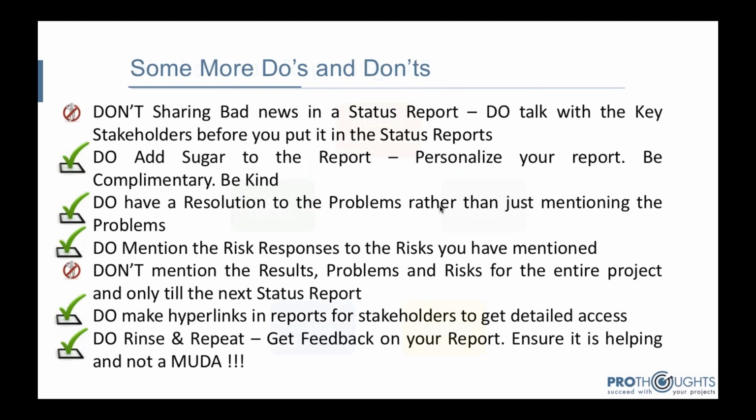So these are some of the things you are going to report on. I have shared some do's and don'ts, which might help you. There are a lot of things, but I just summarize certain ones. When you are sharing bad news, you should share it. When I say don't share, I don't mean don't share. I'm saying do share the bad news, but talk with the key stakeholders before you put it in the status report. Sometimes stakeholders get surprised by the bad news you're putting. Even if it's a risk or an issue in the future, you need to have the key stakeholders' buy-in before you put that in. And do communicate the bad news. The earlier you communicate bad news in the status report, the better expectations you set for the project to run smoothly.